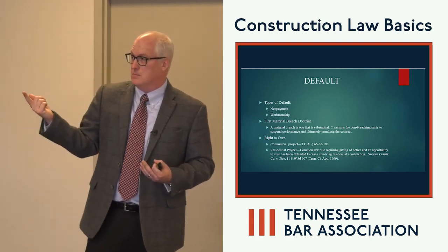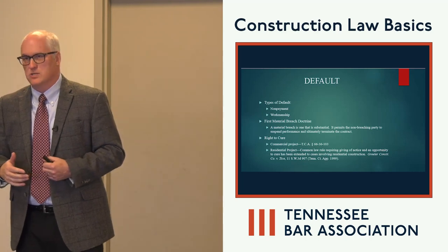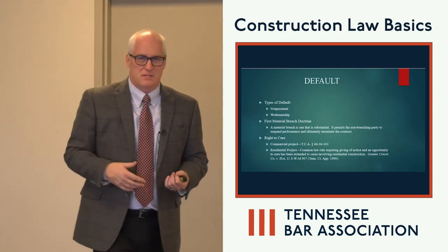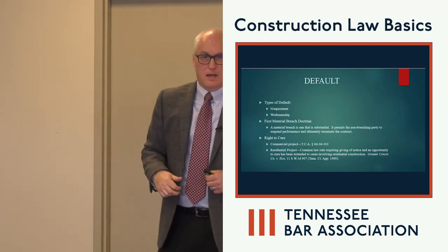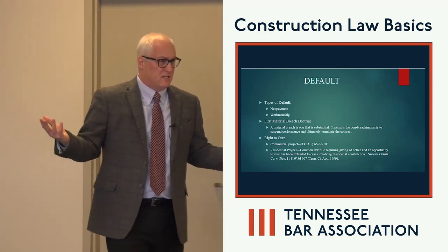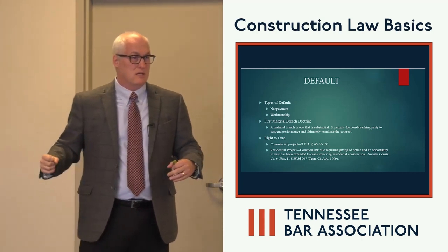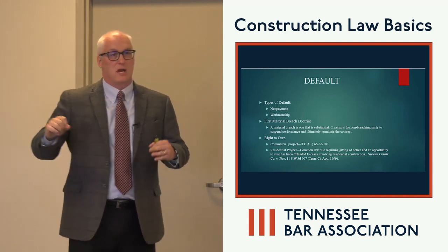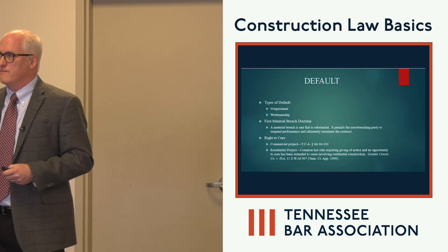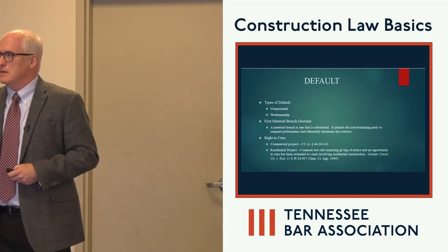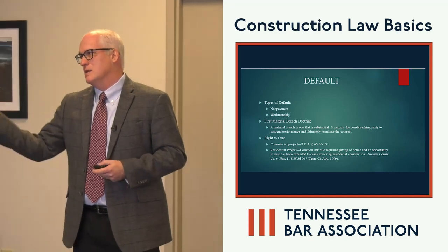I actually used this. It was a small case, but I had a hardwood flooring installer on probably a $25,000 job, and the owners claimed some defects and some other things. He wanted to go back out, inspect, and try to fix it and do whatever he could. They just shut him down. They didn't respond to texts. They didn't allow him to go in and inspect or try to make changes. We got to mediation, I started pointing out the case law on this, and we got a pretty decent resolution for the client. So again, something to keep in the back of your mind.